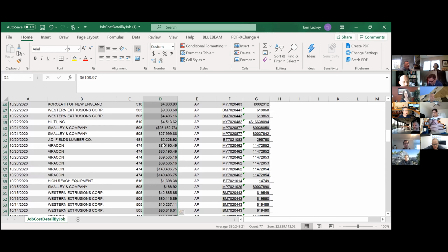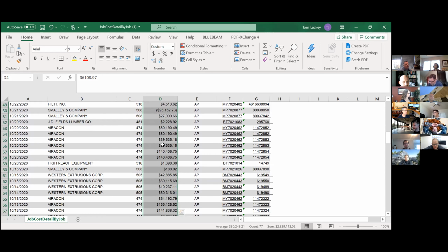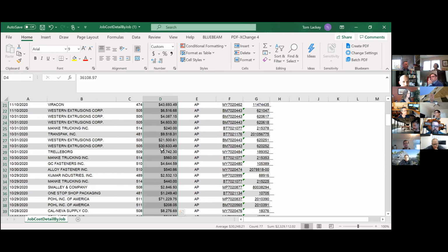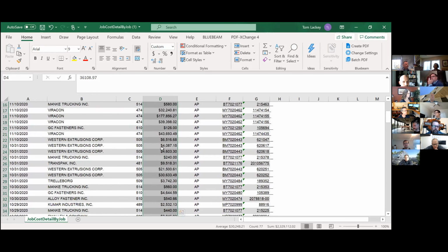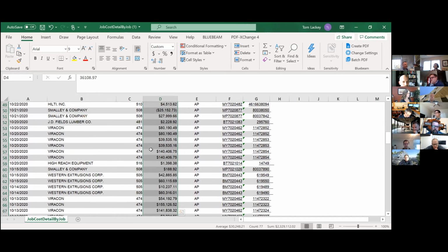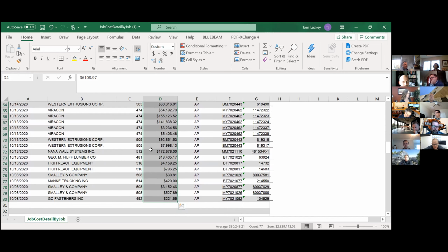And then, Nick, are we taking these and putting them into a folder? Yeah, so you probably want to go through and delete all the negative charges that you have, because you probably won't want to charge for those. I think there's a couple on this. Yeah, there's one here. So you want to get rid of those so it doesn't hit your total number. That sum down there, that 2,329,000, is a rough number of your total billings for that month. You're going to want to tack 20% on that, and that's it. And that's going to be your total number you're going to be billing.